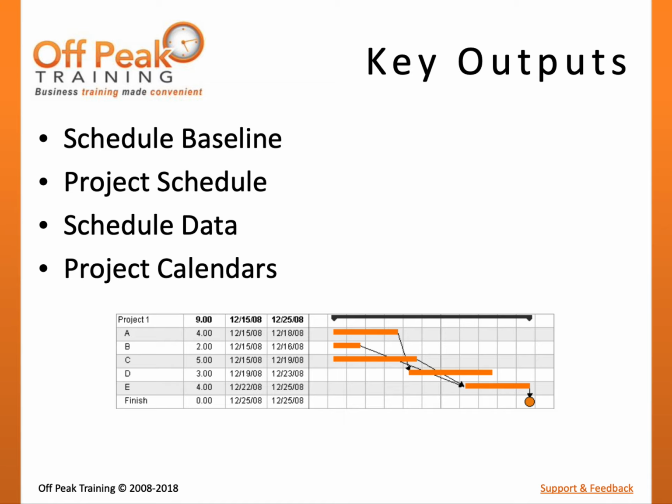Schedule data includes data that supports the project schedule, such as milestones, activity attributes, assumptions, constraints, or buffer information. Project calendars identify the availability of when project work may or may not be scheduled. This provides the most basic set of rules for when activities may be scheduled. However, resource calendars may impose additional rules.